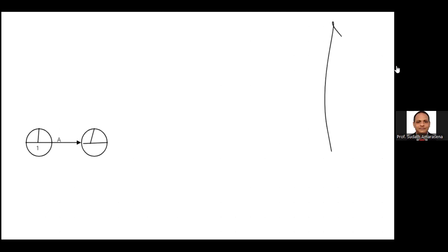Then there should be the second event. Then you can name B and C. After that, for D, we should complete B. For E, we should complete B. After completing B, we can start, after the third event, the two activities D and E both.